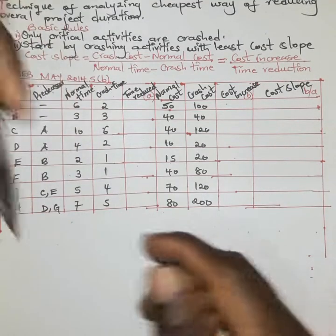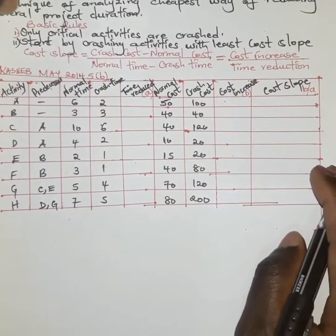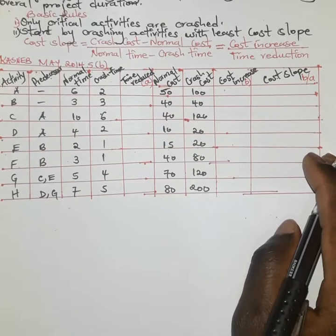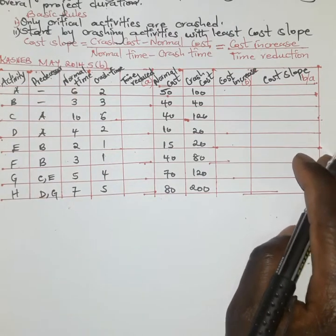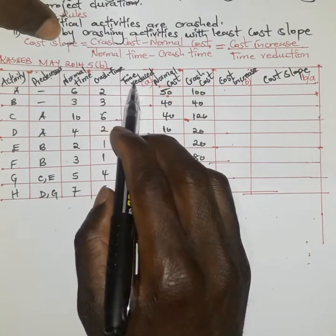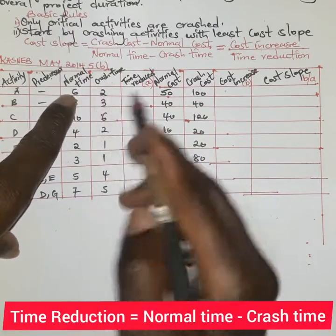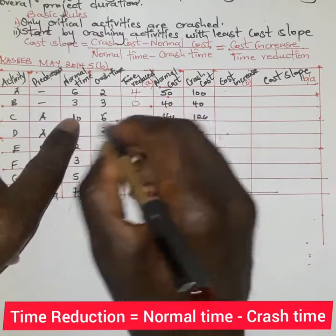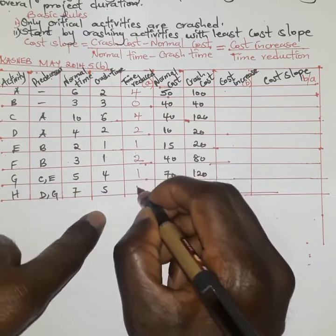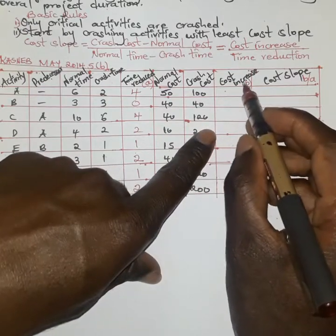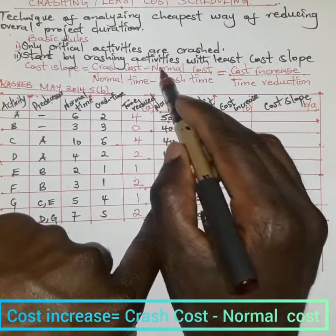We first start by drafting the network diagram, using the activities, their predecessors, and the normal time durations. For determining the time reduced, we subtract the crash time from the normal time — for example, 6 minus 2 is 4. For the cost increase, the formula is crash cost minus normal cost.